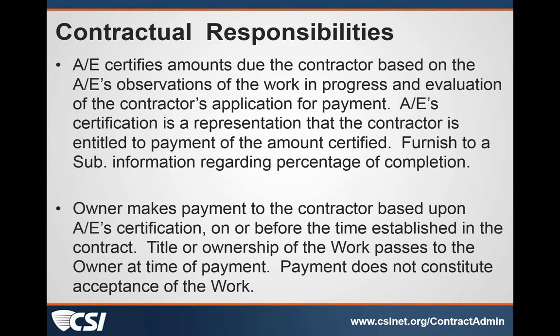And with the certification language in the AIA, they do attempt to clarify that in the general conditions and in the owner-architect agreement, that the certification is based on that architect's knowledge, information, and belief that the work has progressed to the point indicated and the quantity of work conforms to the requirements of the contract documents. So it specifically says that it does not mean that the architect has made exhaustive site inspections, has reviewed construction means, methods, sequences, or procedures, has reviewed requisitions of subcontractors or suppliers, or has determined that the previous certificates of payment have been dispersed as they are supposed to be spent.